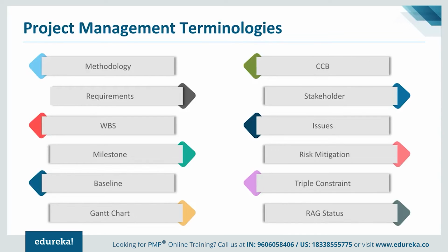If it is behind schedule or over budget, then depending on the severity, you can flag it as red or as amber. It's very important for us to identify the right project status and communicate it so that stakeholders know the status of the project and can respond to your requests accordingly, and if anything needs to be escalated, it will get addressed on time.